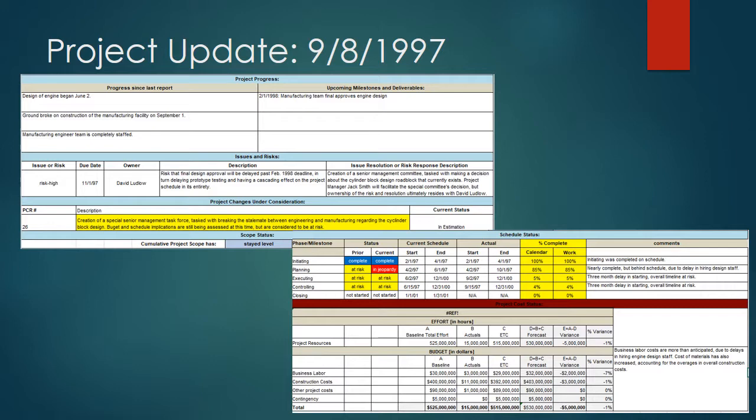At this point, initiating and planning are nearly complete. There's a bit of a delay in the schedule because of delayed hiring of design staff, but that is now complete. The stalemate: the engineers believe their design is top-notch and will reduce the risk of oil leaks. On the other hand, manufacturing does not think this design is appropriate for high volume production. Jack Smith needs to decide how to break the stalemate. He's decided to make a task force of senior management with David Ludlow heading it to resolve the dispute.